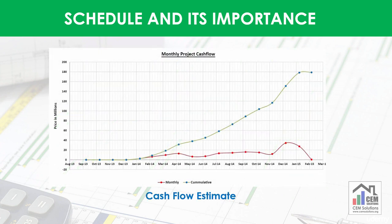Schedule helps in making project funding requirements or cash flow estimates. Cash flow is a document or graph which shows periodic distribution of cost of the project on the basis of the timetable of activities. With a cash flow estimate, progress of the contractor can be monitored, and it is also used by the client to make funds ready for the contractor.